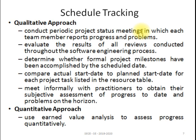In each meeting, each team member reports progress and problems they are facing. Next, we evaluate the results of all the reviews conducted throughout the software engineering process. We determine whether formal project milestones have been accomplished by the scheduled date — with the help of milestones we calculate the percentage of project completion. We also compare the actual start date to the planned start date for each project task listed in the resource table.